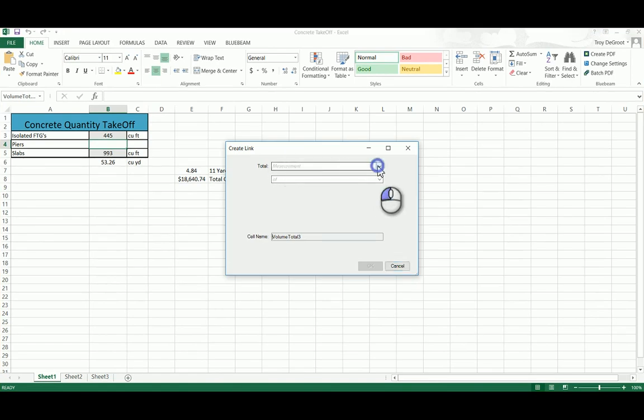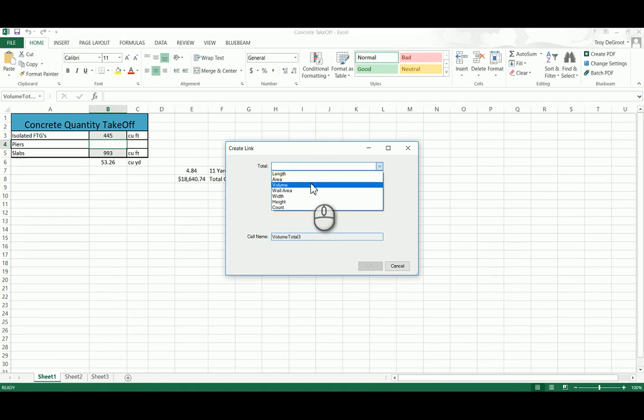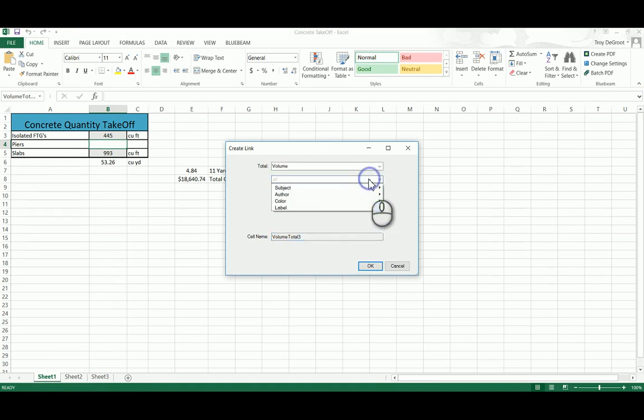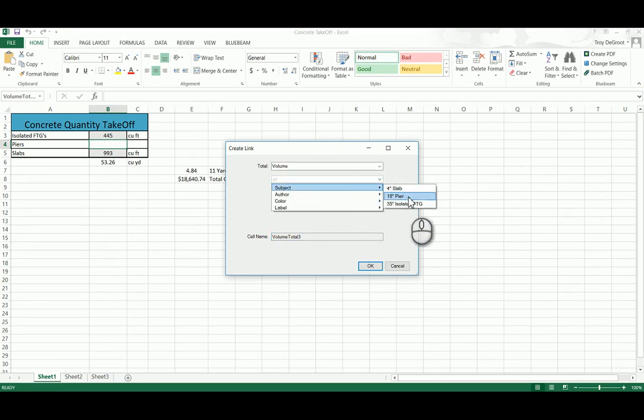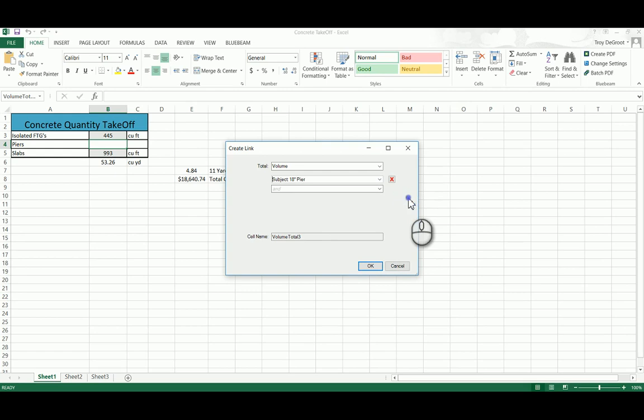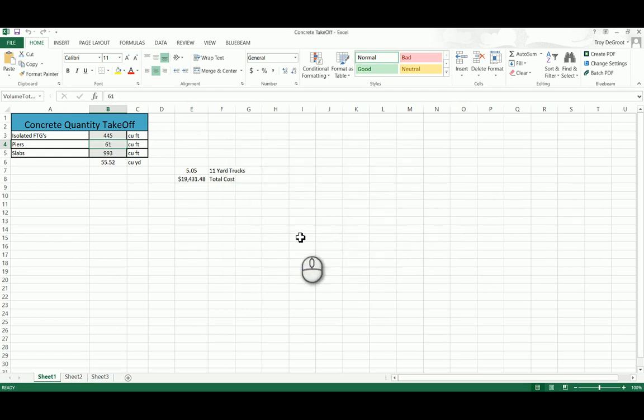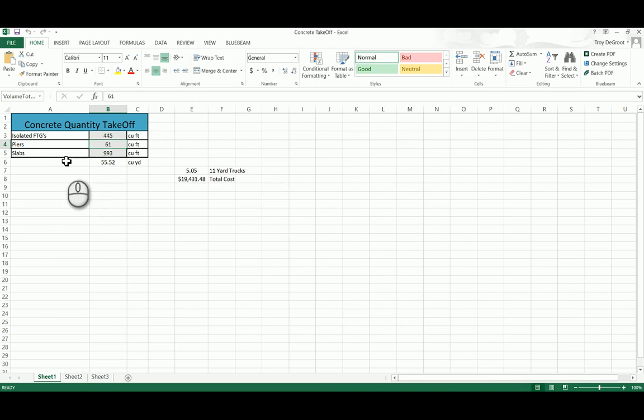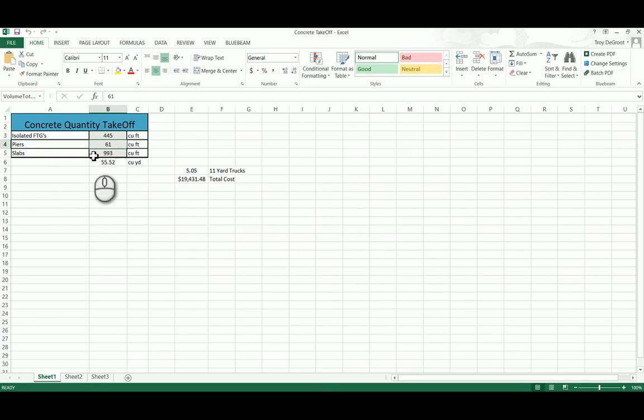It's going to open up this window in Excel. I want to look for the volume of, and I'm going to look at the subject, the 18 inch pier. Click on that. And then I just say OK. It's going to put that quantity in here. So any more markups that I do on that PDF will calculate in here as well.